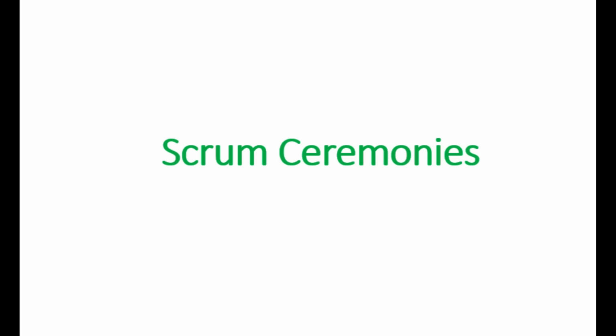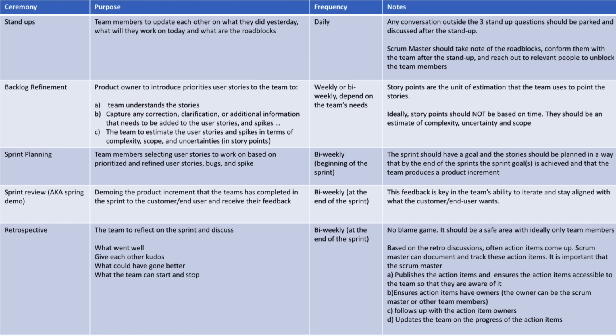Stand-ups. Stand-ups are short team huddles that normally happen every day. They are sometimes referred to as daily stand-ups. During stand-ups, team members update each other on what they did yesterday, what they will work on today, and what the roadblocks are. Please note that the team members update each other in the stand-ups. Also, any conversation outside the 3 stand-up questions should be parked and discussed after the stand-up.